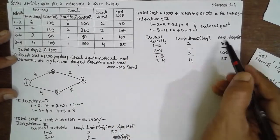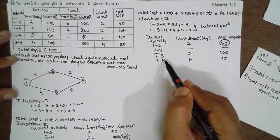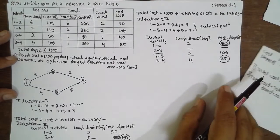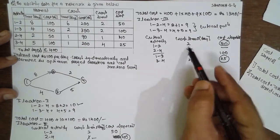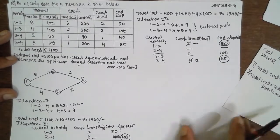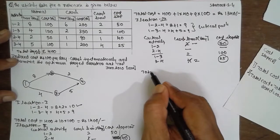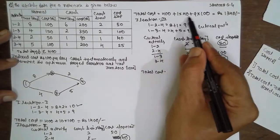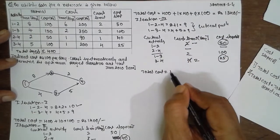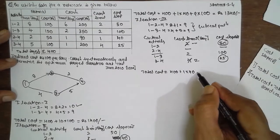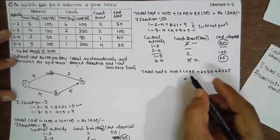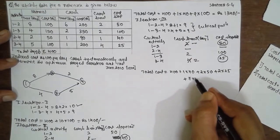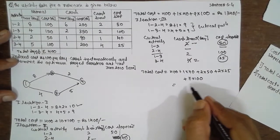We can crush by 2 only, because activity 1-2 is limited to a crash limit of 2. So crush activity 1-2 by 2 and activity 3-4 by 2. Total cost: 400 plus 1 into 40 plus 2 into 50 plus 2 into 25, plus indirect cost. After crushing it becomes 7, so 7 into 100. The answer is rupees 1290.